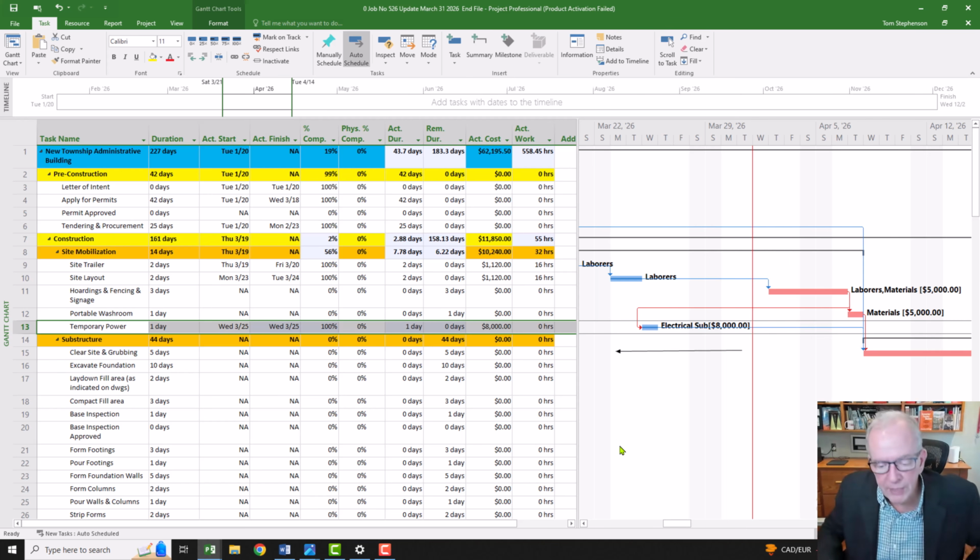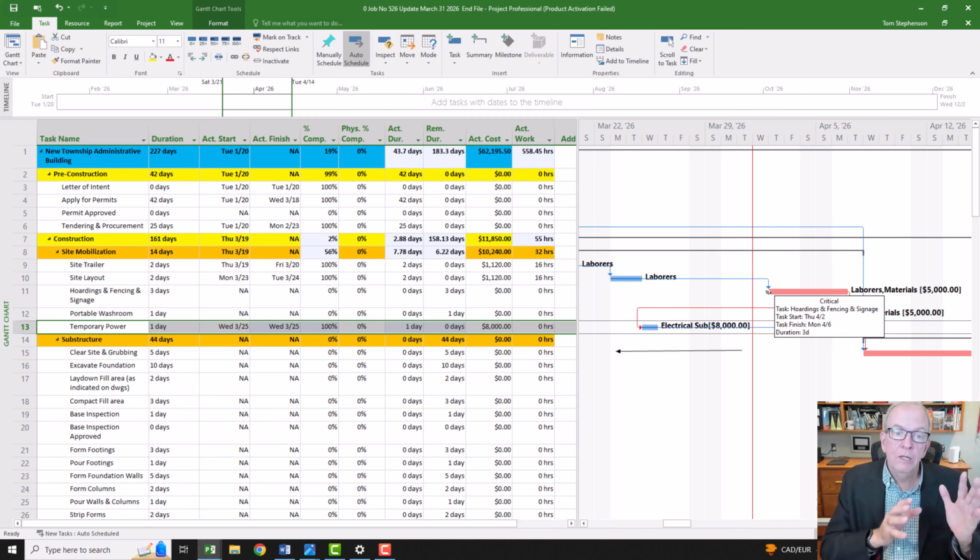So my point with the updating is, is everything represented the way that it should be? Like as of the status date, what is done? Well, yeah, this one got done ahead of time. This one did. And this one had to be rescheduled. So we didn't even start this. It would have been back here. So we don't just leave it with 0 on it back here. We reschedule it. Now, if it was started and not completed, then we would have split it.